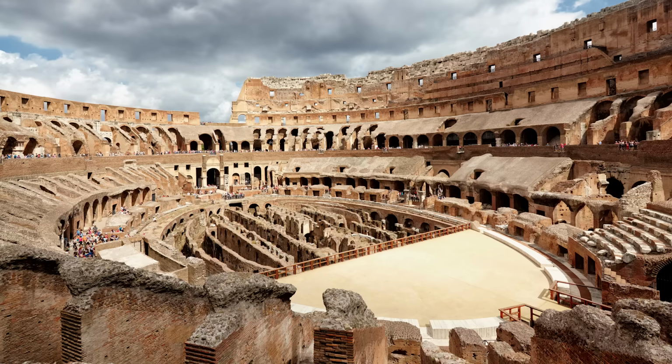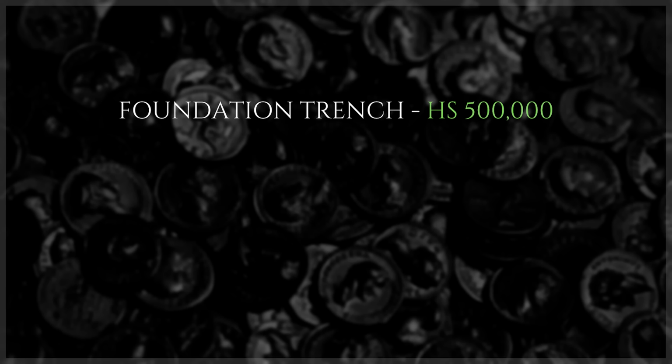I'll assume that the workmen earned an average of 4 sestertii a day, which seems to have been the going rate for a laborer in first-century Rome. By that reckoning, the cost of clearing the Colosseum's foundation trench was in the neighborhood of 500,000 sestertii. Next, the foundations were laid.